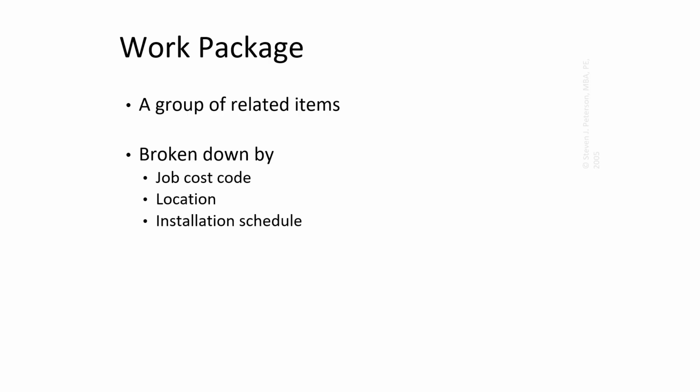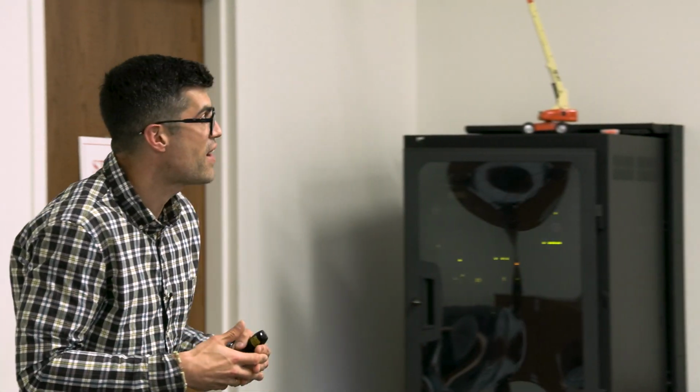When we're looking at work packages, I also like to break it down per cost codes. You guys will always want to assign some form of coding to your subcontractors or to a work package. And this, to me, a lot of times is really to help on your internal documentation more than anything. I will cost code line items to help me find information. That's really what it comes down to: if I need to be able to extract information, I like having a cost code associated to it. It allows me to pull data out of my Excel spreadsheet faster, right?